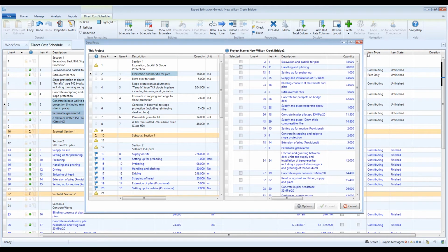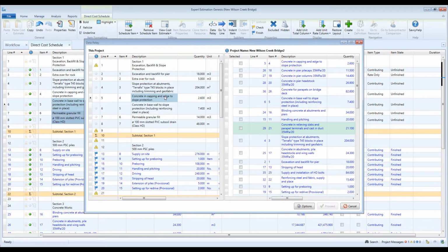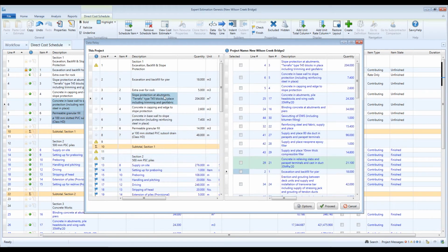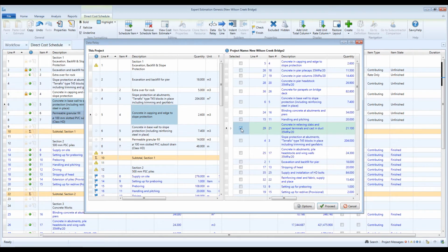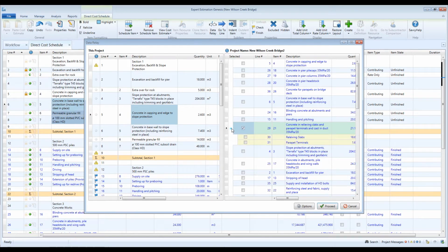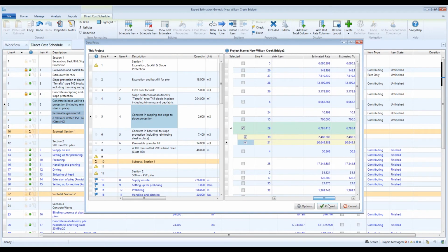In this example, these two projects are going to have matching items, so for anything that we click in here, there will be a corresponding item for each one. The Data Relay will import everything that can be used in a cost schedule, or anything that will be brought in during a normal copy and paste operation. You'll get the item cost estimate, potentially child items if you select them, global defines, and all the resources that you used. For example, back to this concrete item.